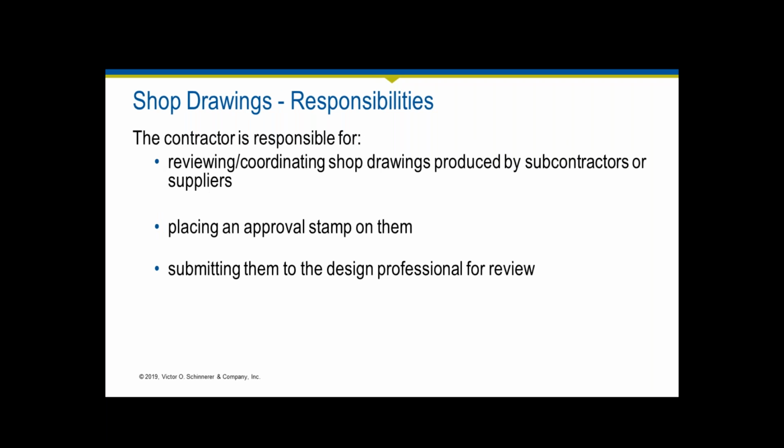So the other thing to do is to make sure that the contractor knows what their responsibilities are. Obviously, shop drawings should always come from the contractor, and they should affirmatively check what the subs and their suppliers are proposing, review it, and then pass it on to you. As such, you should always insist that the contractor indicate that they reviewed what the underlying submittal is before giving it to you for your review.